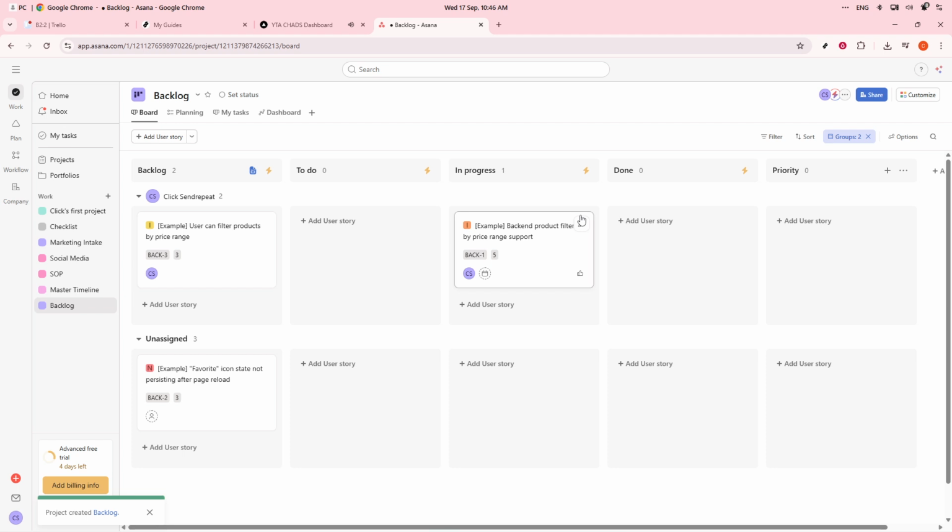The timeline view can help you map out your sprint planning and maintain a balanced workload across the team. Dashboards are invaluable for tracking completed tasks, assessing velocity, and spotting bottlenecks in real time. During daily stand-ups, you can filter your tasks efficiently, and for sprint reviews, mark completed ones and return unfinished tasks to the backlog. Don't forget to create a recurring task for your sprint retrospectives to capture team feedback.